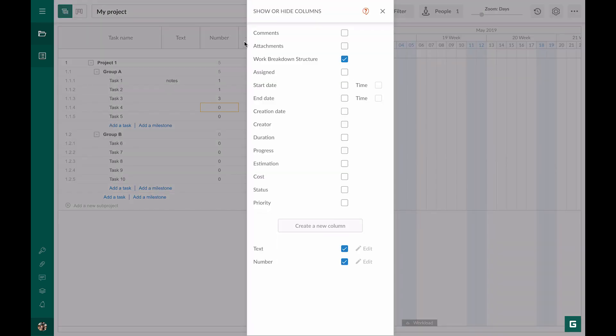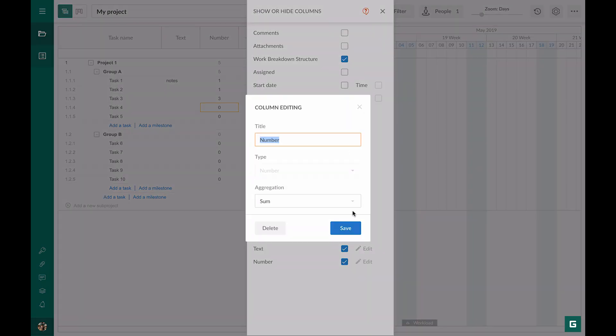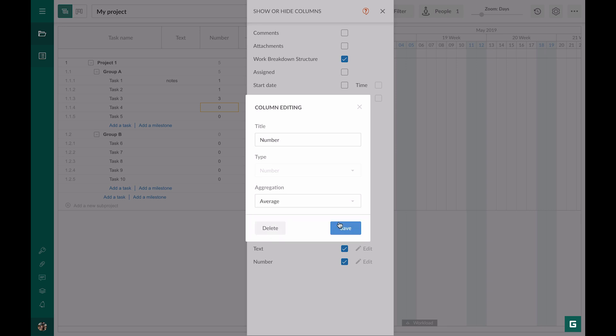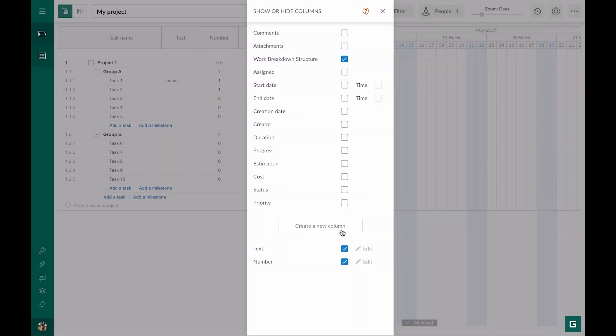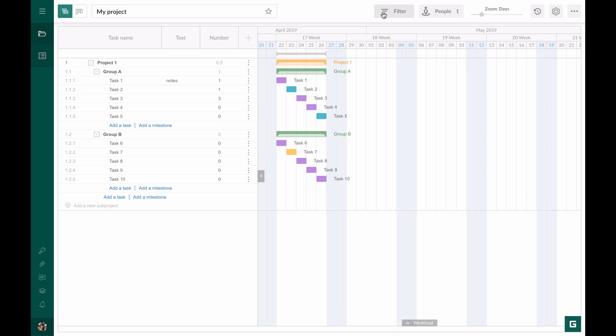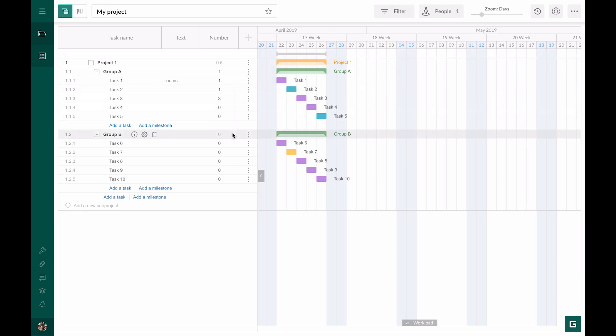We have one more aggregation option, Average. Each parent task shows the average number as well as the whole project shows the average out of all parent tasks.